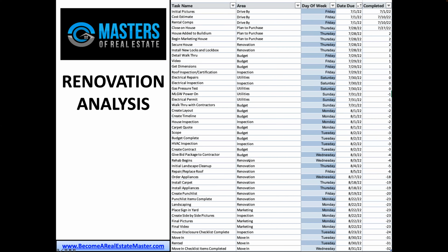getting your inspections and utilities on, getting your budgets finalized and your inspections finalized, and then starting your renovation all the way through marketing, inspection after the fact, and that follow-up after the fact with regard to your quality control, and then moving a tenant in or getting a property handed off to a realtor for sale afterwards, updating your final comp analysis and your final numbers one more time at the end of the project.